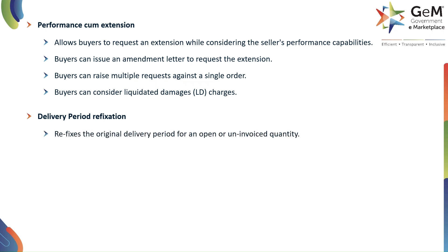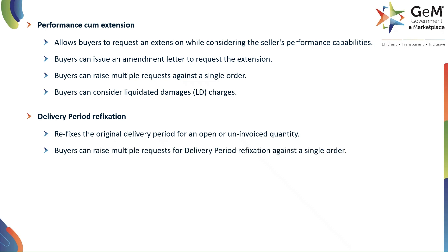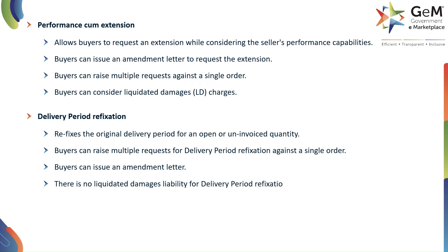Next, delivery period refixation refixes the original delivery period for an open or uninvoiced quantity. Buyers can raise multiple requests for delivery period refixation against a single order, and buyers can issue an amendment letter. There is no liquidated damages liability for delivery period refixation. Remember, the maximum delivery days including any amendments should not go beyond 180 days.